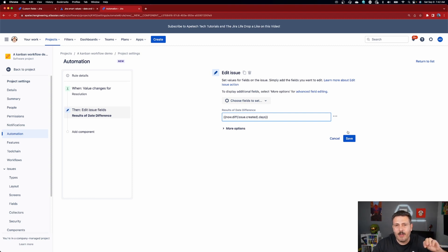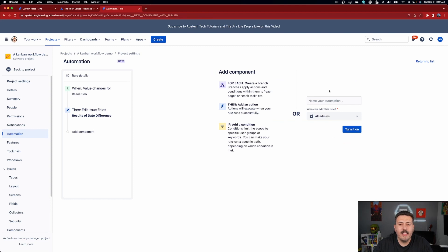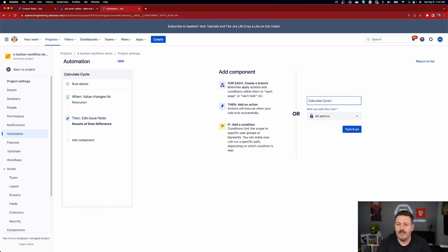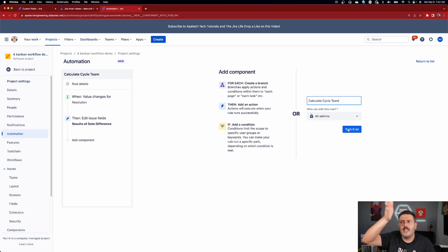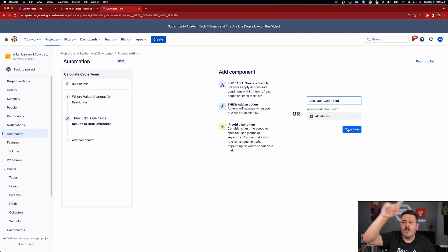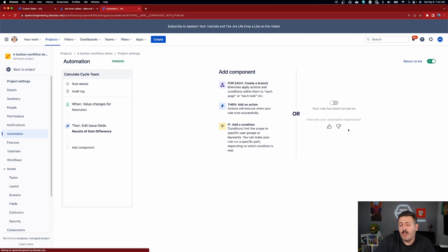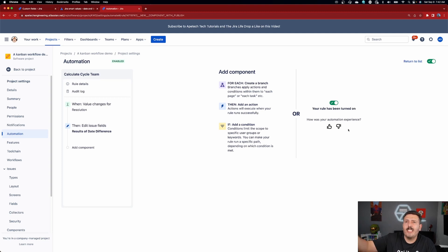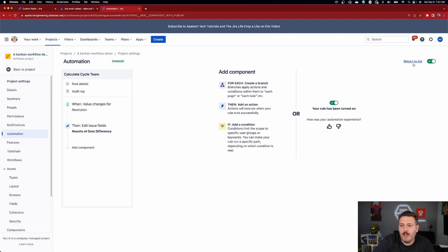Once you have this, click Save and name it 'Calculate Cycle Time' — let me know in the comment section if I got the wrong term. I don't think it's lead time because lead time is from the moment you started to the moment you work on it. We're looking at the whole thing, which should be cycle time — how long did it take to finish this particular item. It's a really good metric to know how much time it's taking your team to finish an entire request.